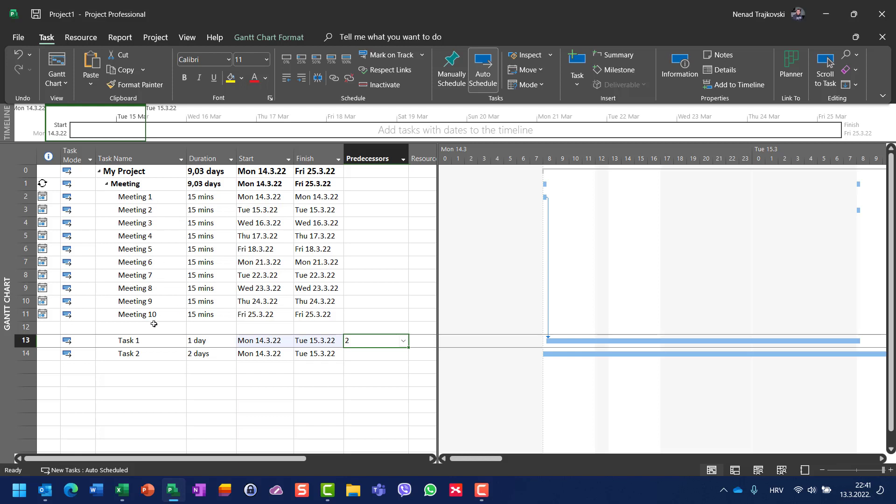Because this task is supposed to last eight hours and it is supposed to start after a meeting, there are no eight hours at Monday because the meeting took 15 minutes. So after that, those 15 minutes should be worked on the next day.